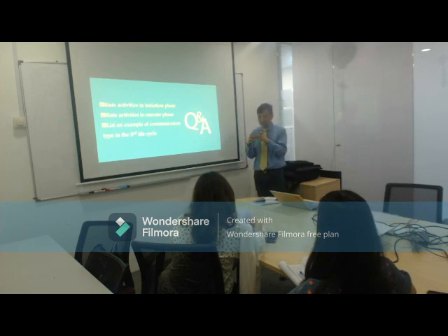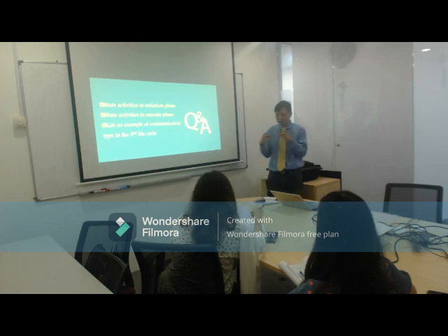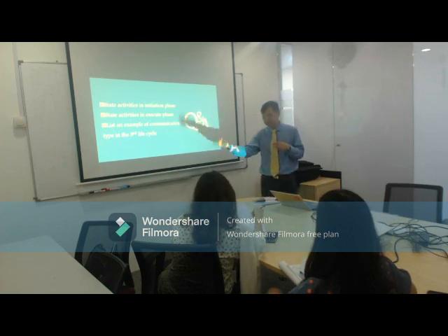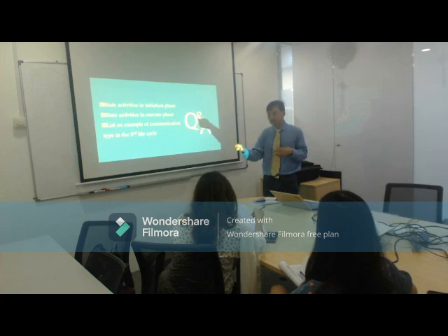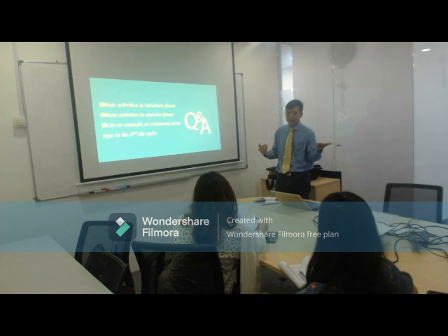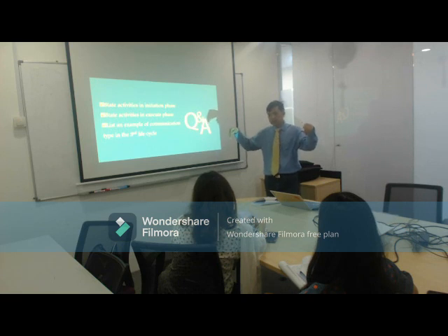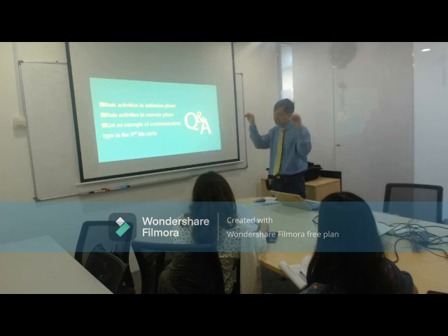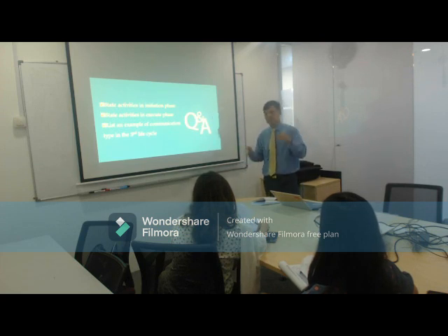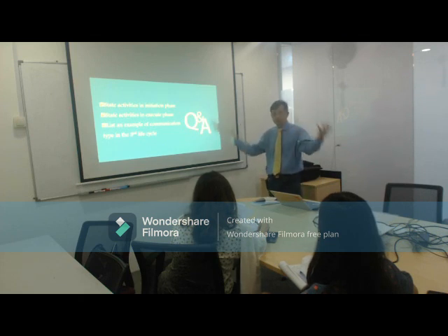Another area is that we may need to communicate with these agencies to say that I want to get this permit. Then the agencies will list out for you the things that you need to provide them. Okay? For example, drainage and irrigation. They don't want you to start building a bridge and after that cause a landslide in the places. They don't want you to build a bridge where after a few times you use, one side will collapse. Yeah? They don't want you to build a bridge where nobody is going to use.